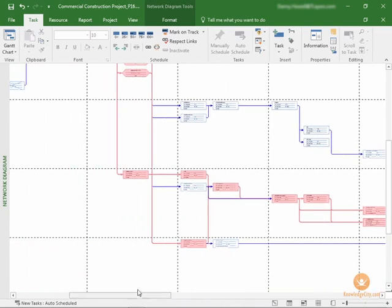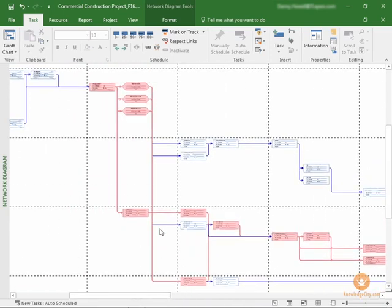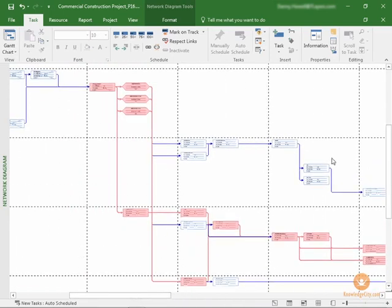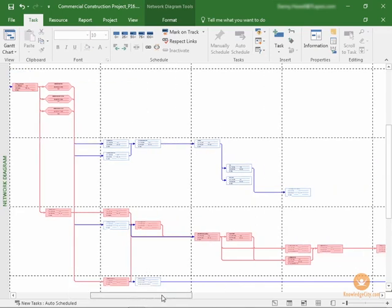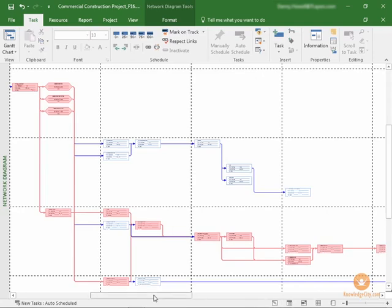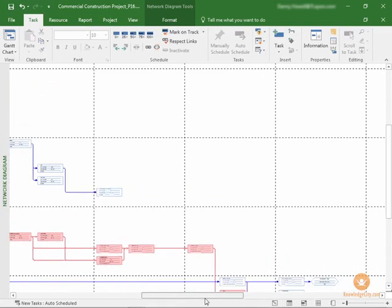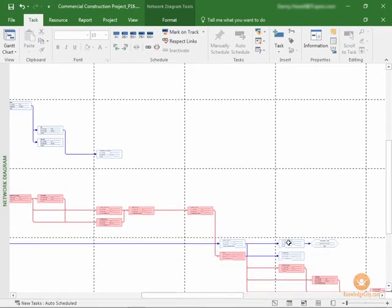So you can see here where there's a branch off of a separate set of tasks that these are not necessarily critical and do not affect the finish date of the project. They're still important, but they do not affect the finish date. These tasks do, in fact, affect the finish date. So if they are late, then the project will be late.